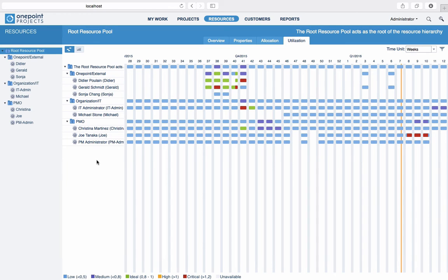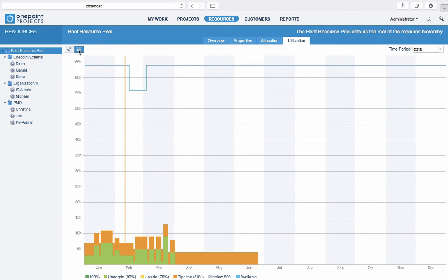Similar to other time-based overviews, you can choose between different time units. The second graphical resource overview displays a histogram visualising resource utilisation based on project probabilities. The additional blue line indicates resource availability over time and also takes unavailabilities into account. The main application for the resource histogram is to assess future resource demand based on current resource planning.